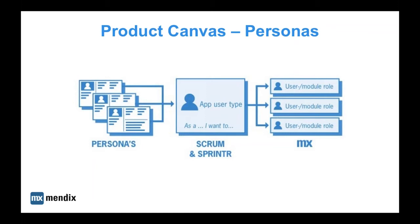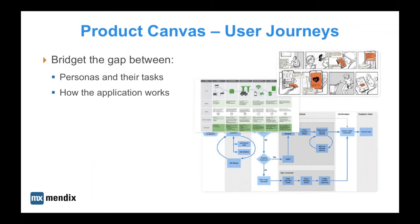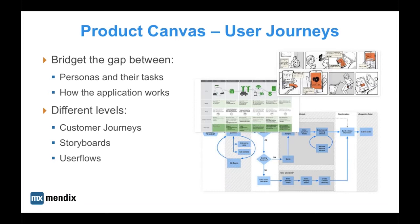After researching our users — knowing who they are and what they need to accomplish — creating user journeys bridges that gap by sketching out the journeys users will undertake. There are different levels of abstraction: customer journeys, more common in marketing, map out the total experience; storyboards are much more concrete and offer a great way to add context and enable storytelling, looking a bit like graphic novels; and at the lowest level of abstraction we have user flows, which are quite similar to microflows. Creating user flows is the advised minimum for most projects. In almost every case, a user journey can be translated into an epic, which can be split into user stories and tasks for a sprint.